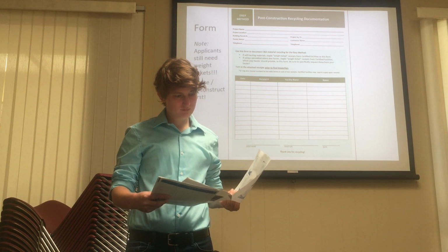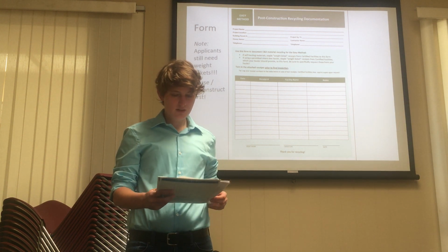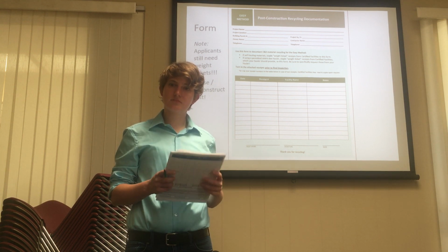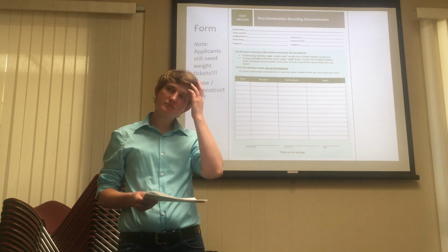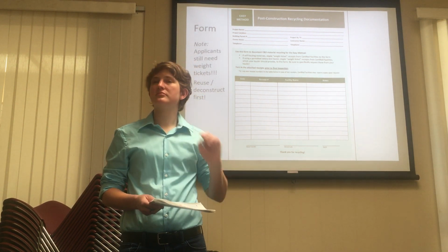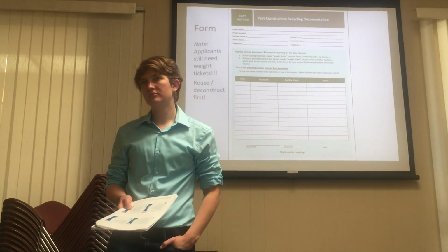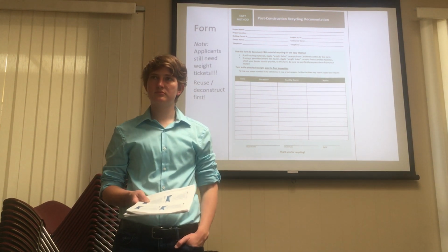So once they fill this out and turn it in to us and we say it's okay, what do we do with it? Just file it, archive it. File it, keep it, for at least five years. The only way anyone is ever going to ask you about it is if the state comes knocking and says, how are you doing with your construction and demolition program? I'd like to see evidence that you are getting these C&D forms filled out.